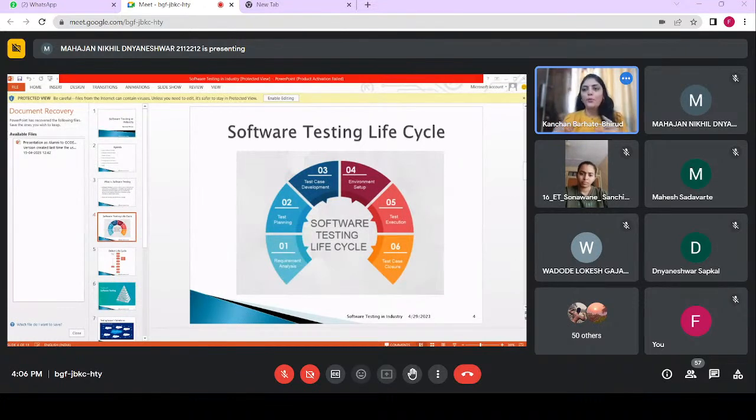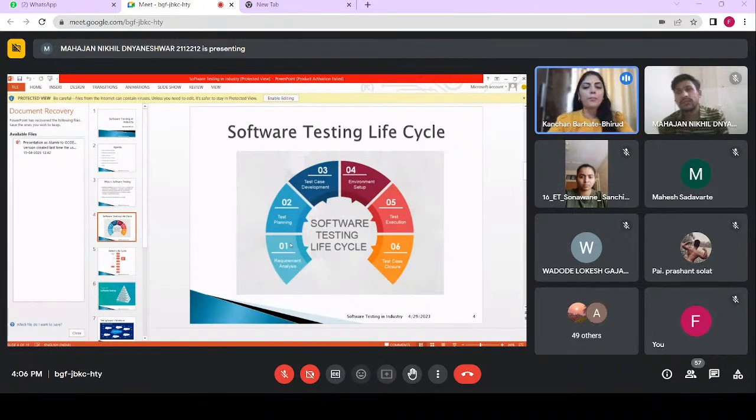There is a summarized report where the QA team writes all the test cases, how many test cases are executed, how many defects are found, how many are fixed, how many test cases pass and fail, the ratio of passing and failing test cases. And they will discuss the lessons learned. So in the whole STLC process, of course they will have some lessons learned, right, that this can be improved. So they will discuss, make a document, and use it for further releases and further processes in STLC.